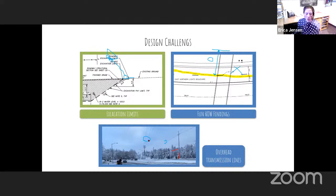Normally around these high voltage lines, you have this big radius of area you can't enter. So no crane can go into this big radius. When the lines are de-energized, the radius is smaller, so you can get closer to the line. So that helped quite a bit. Then our crane could enter that space. Same thing over here. You had a smaller radius that you weren't allowed to enter when the lines were de-energized.